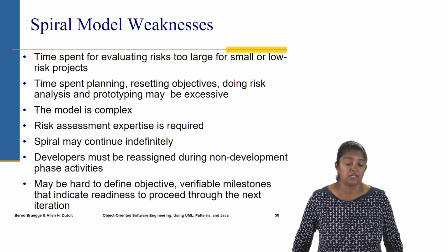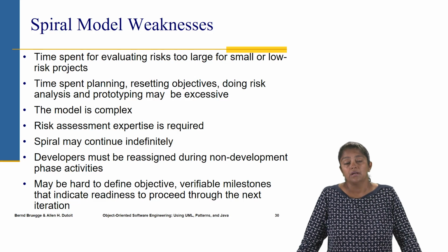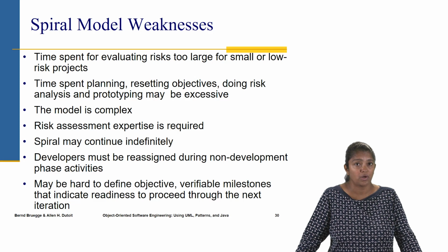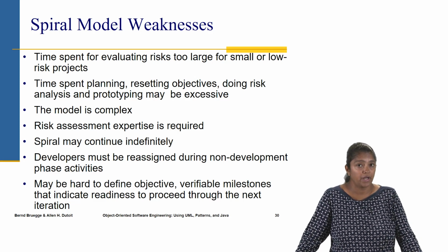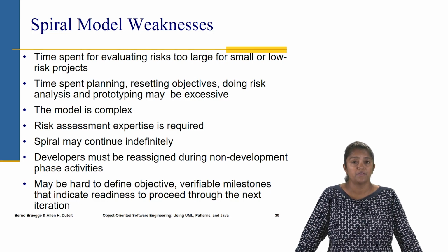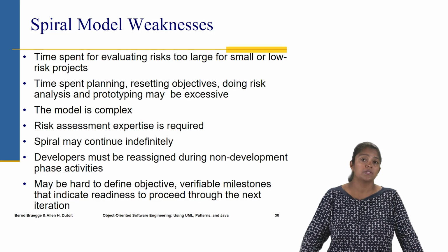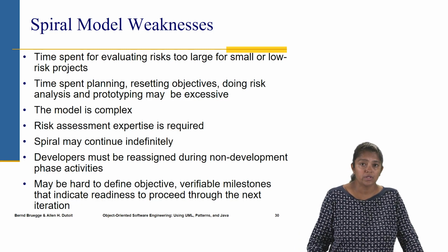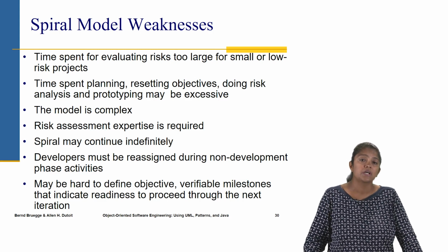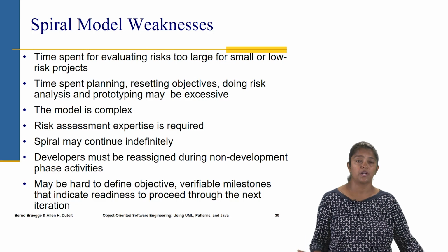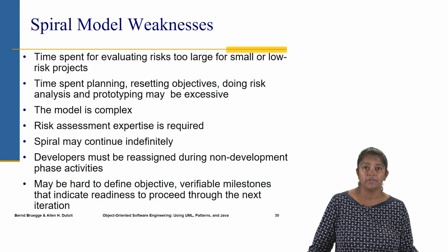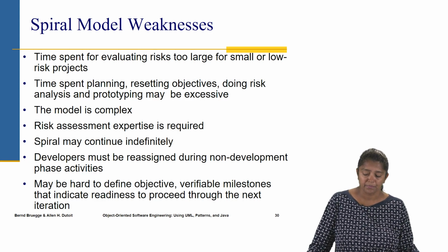Now the weaknesses. One of the major weaknesses is that evaluating risks is expensive. A lot of time is spent on evaluating risks in this model, and it takes a lot of time and effort, and it might prove to be too expensive for small or low risk projects. So it's not a good fit for small or low risk projects. It's typically done for large projects, research projects that involve a lot of risk, or other kinds of large projects where some completely new kind of product is being developed, and if the market needs to be tested for it.